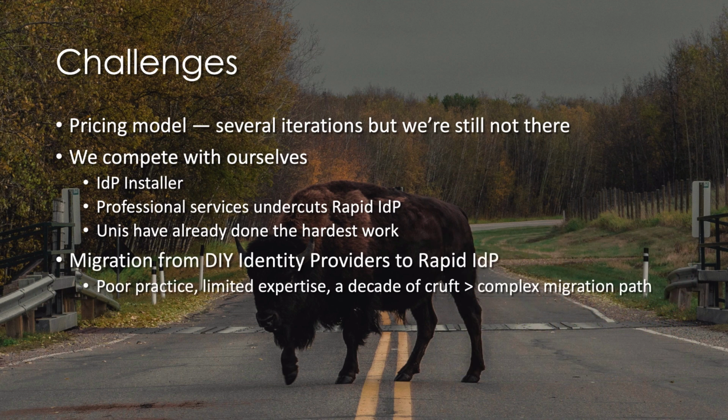Migration has been challenging and a lengthy process. I think I mentioned that one customer is still nearly 12 months into the process and we still don't have a test environment up and running for them. And that's because of years and years of poor practice, limited expertise at the other end, so that they don't quite understand how to do things, because people have gone, and a decade of accumulation of craft. So you often have a range of people stepping through and working on the identity provider over the years. They don't always understand what's gone on before, so they just carry the config forward and this accumulates, and now we're having to unpick a decade's worth of changes.